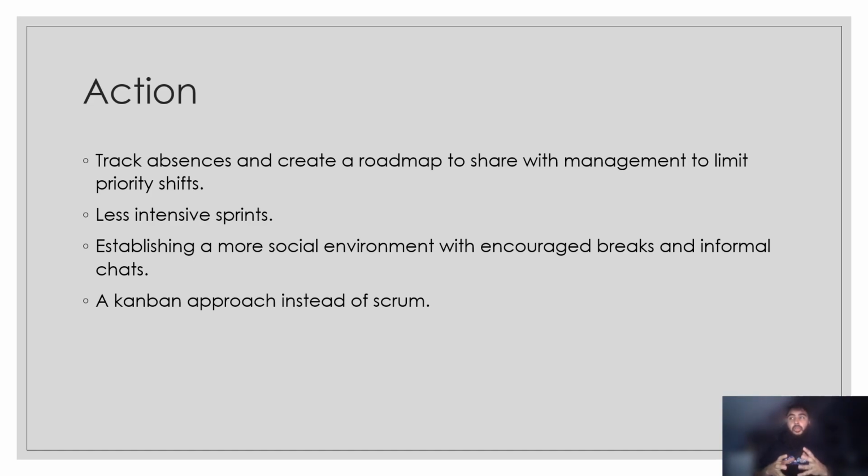Also, it's really helpful for project flexibility because if something does happen and you need to shift priorities or bring something in, you can bring it in straight away. There are no sprint goals, nothing you need to specifically get done within 2 weeks. So it's really helpful for an environment like the NHS where things are really volatile and there's a lot of priority shifts. Kanban also allows you to deal with requests and urgent issues, and you can still be very communicative. You get the benefit of the Scrum communication and whatnot, while being as flexible as possible.